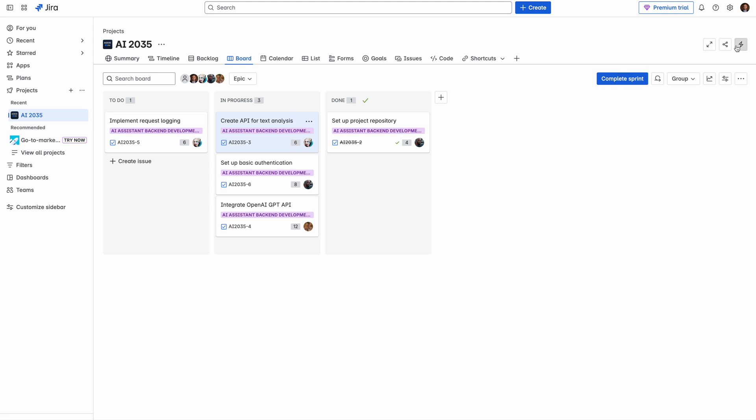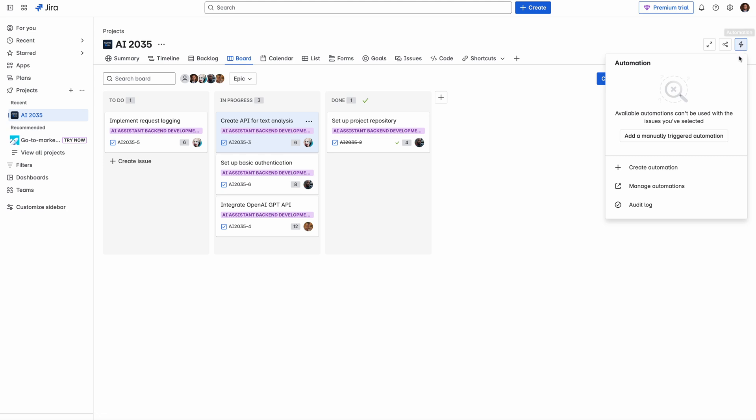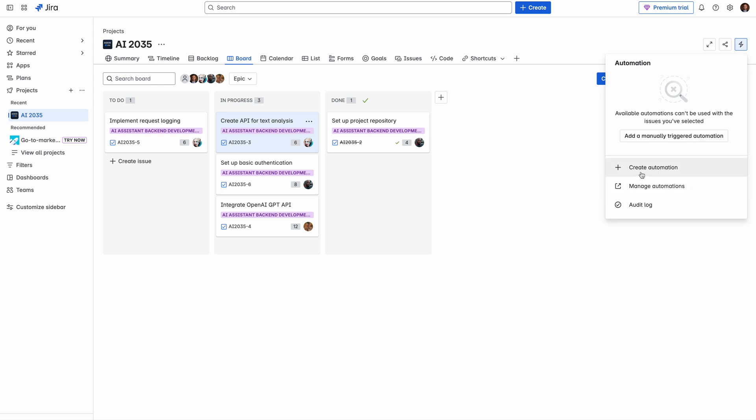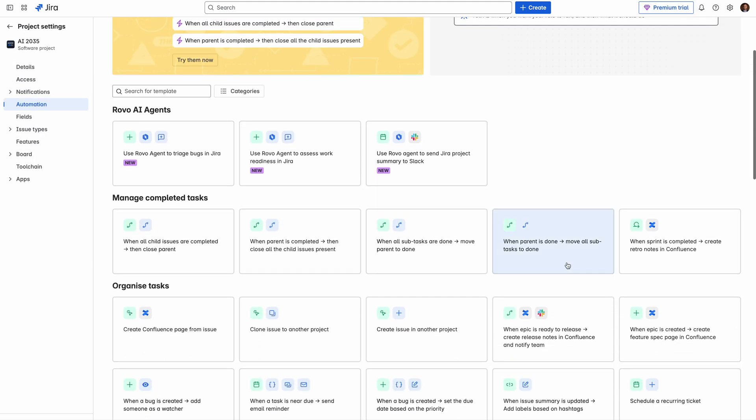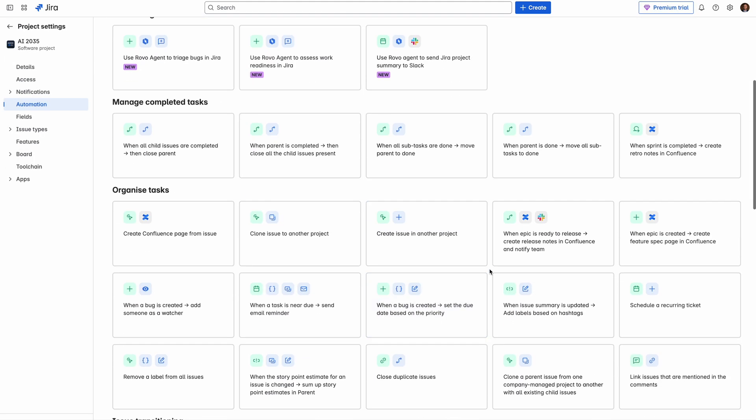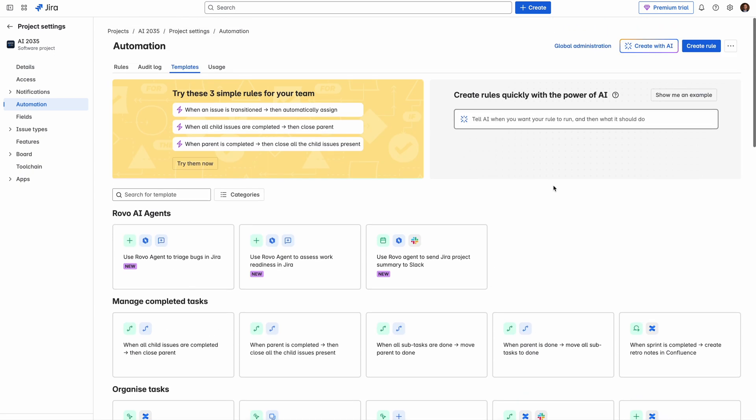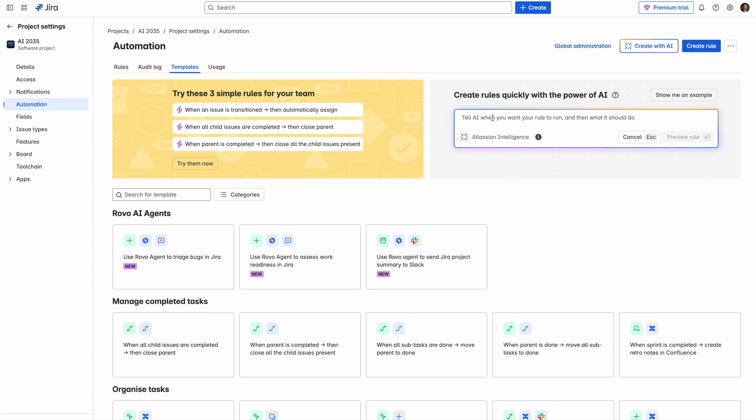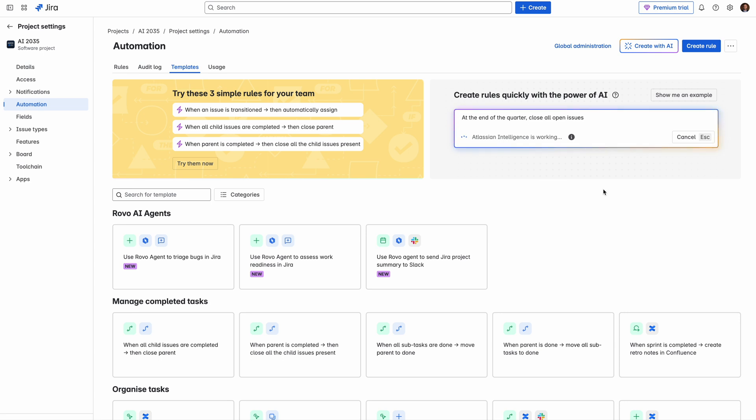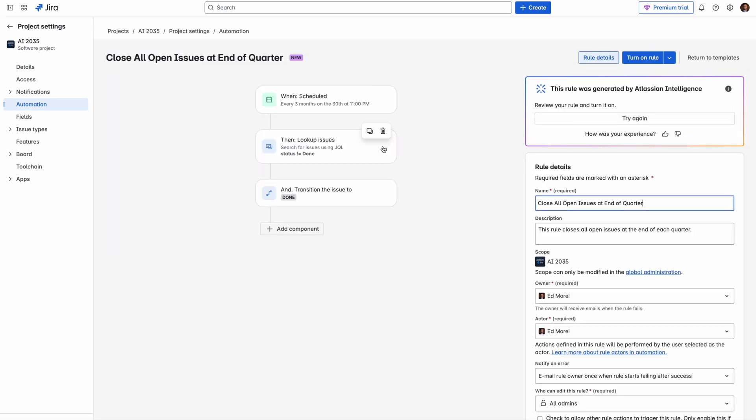Now, another example, it's a very powerful automation tool. A lot of different templates and any tasks that you have done previously manually can be automated. See examples like all child issues are completed, close parent, etc. You don't need to create a big hard workflow. You can just quickly type what you want and AI will automatically create for you a rule with all needed workflows to cover what you need.